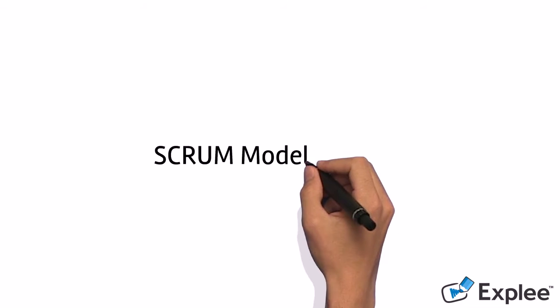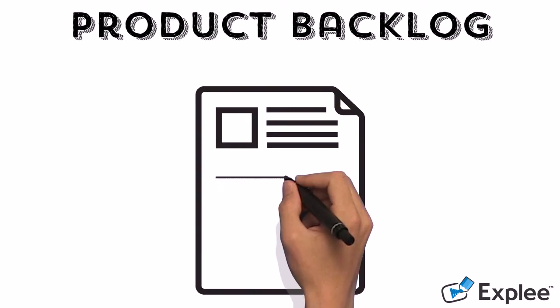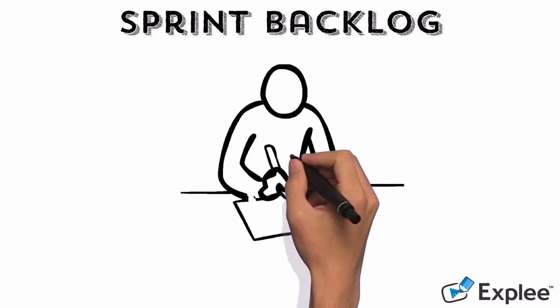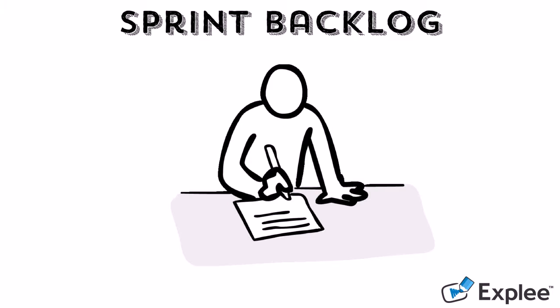And now, what about the operation of SCRUM? First, the client, or sponsor, or product owner, defines the system requirements to develop the product backlog, always under the supervision of an assistant, or Scrum Master. Second, these requirements are broken down into several more manageable work packages.